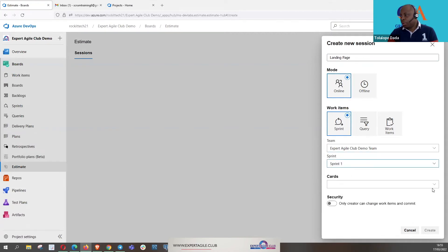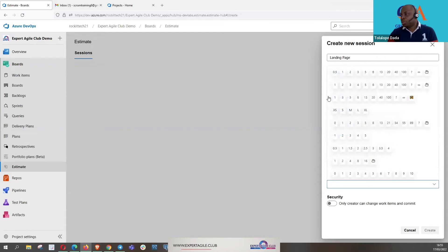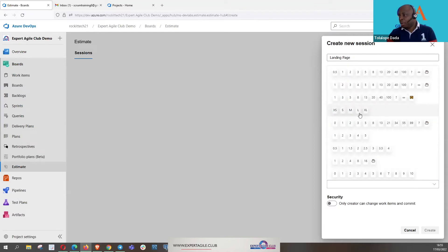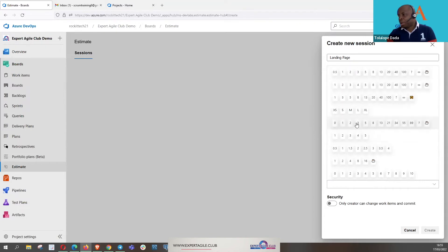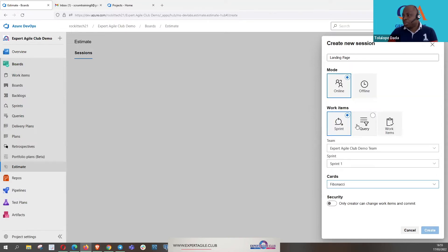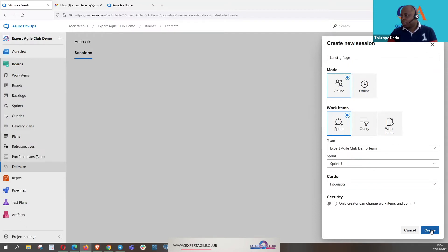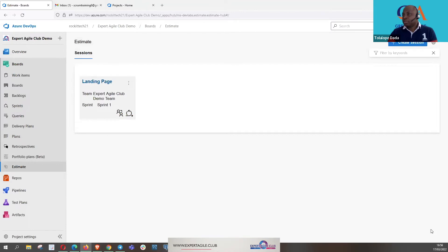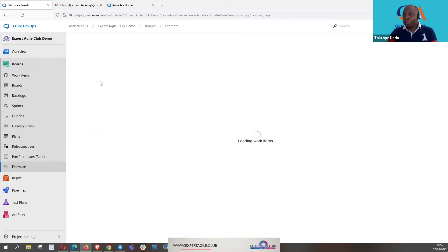Again here, we have a choice of cards that we can use. We have about eight of them. We have T-shirt sizing as well, we have Fibonacci sequence. We have other custom-made ones, but this is one we normally use, it is Fibonacci sequence. So we click on this to give us that Fibonacci sequence and then I'll create the session. Create. And then I will now click on once it's created it appears here, I will now click on this landing page which is the title.